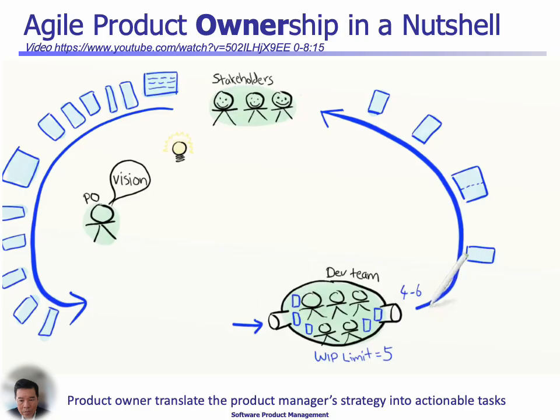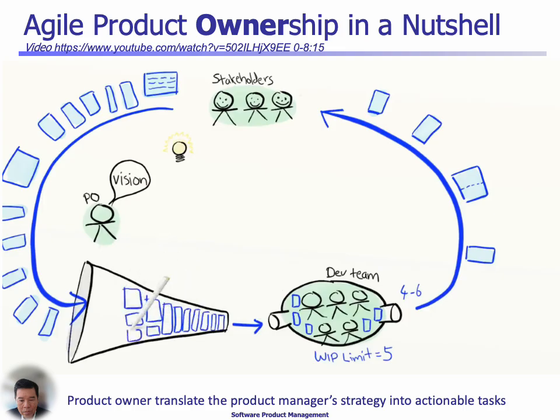Whenever they finish one story, they'll accept one new story, thereby making sure that they never break the limit of 5 ongoing stories. Both of these approaches work fine, in the sense that the team will have just enough work to do and they'll be able to work fast and effectively. A side effect, though, is that there will be a queue forming in front of the team. And that queue in Scrum is called a product backlog. The queue needs to be managed.